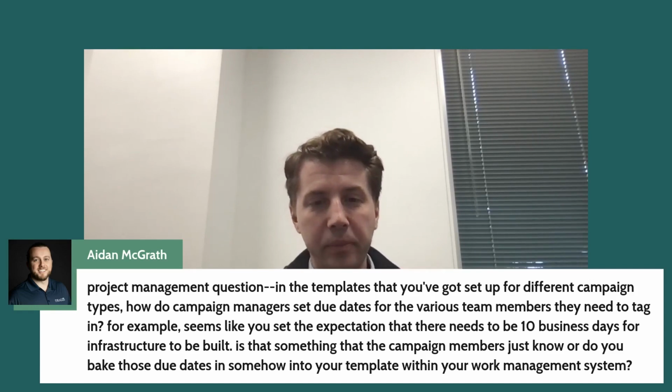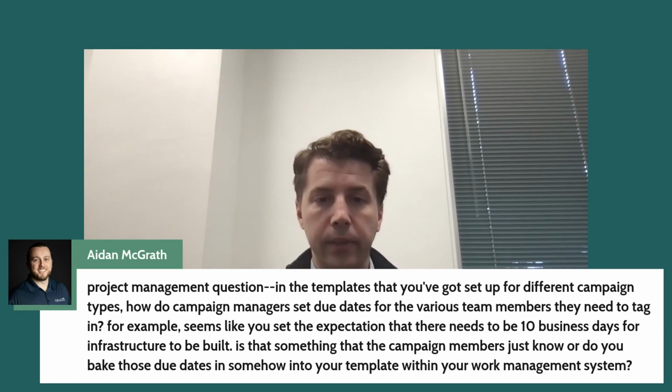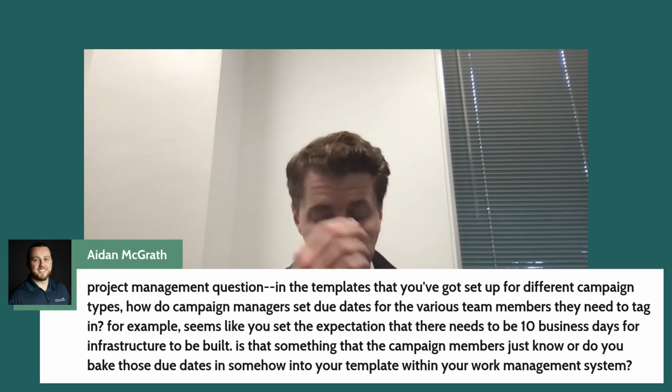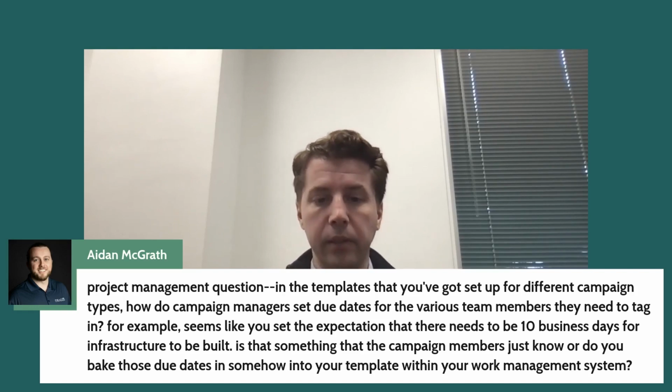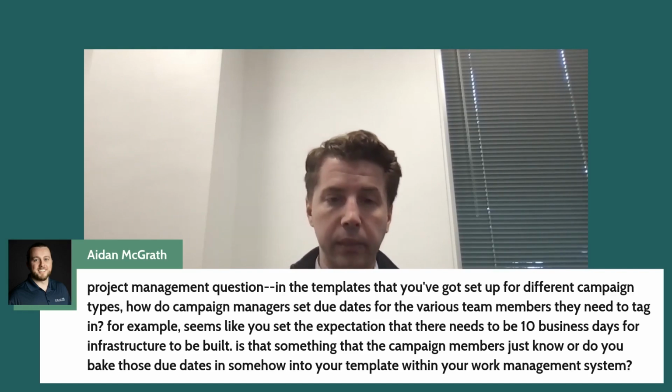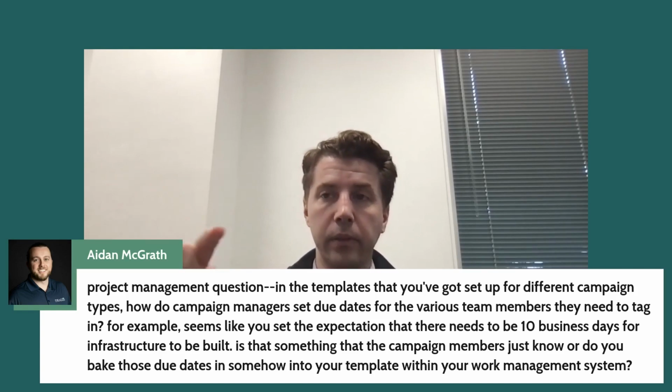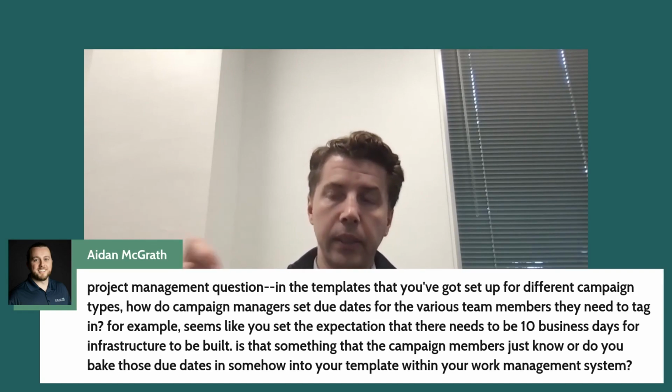Yeah, I mean, those standard SLAs are baked in the bill of materials as well as our reg process, so it usually gets auto-created. Now that's the dream, obviously, but if you're still working in spreadsheets, for example, you just have to look at your spec sheet and say, this program type takes this long, and here's what we're going to try. We're going to set the due date, and that first send date can change if you're not getting all the requirements or if other things change upstream from you. But that's the initial target date.